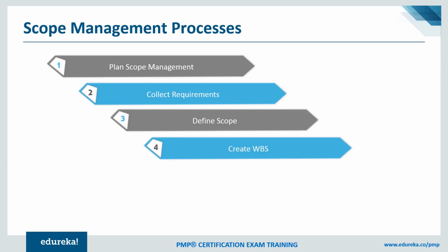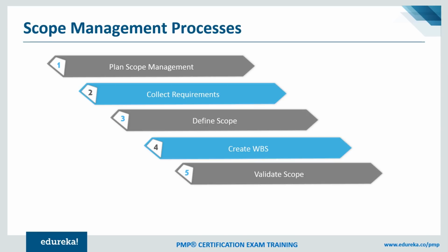The create WBS process certainly gives us an idea about the low level activities, tasks, and work packages that we have to work upon. And decomposition is one of the techniques that is used while creating the WBS. So creation of the WBS is definitely one of the important processes within scope management. Then we have to validate scope against the acceptance criteria that is defined between you and the customer. For each deliverable that you're producing by the end of each phase in the project or product lifecycle, it's important to define very clearly the acceptance criteria.